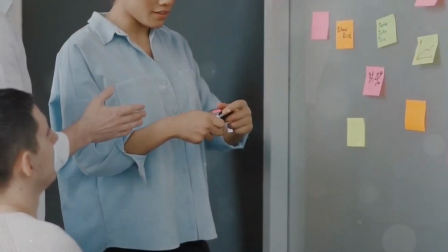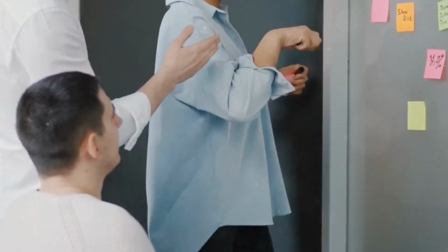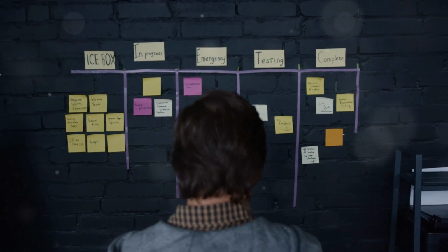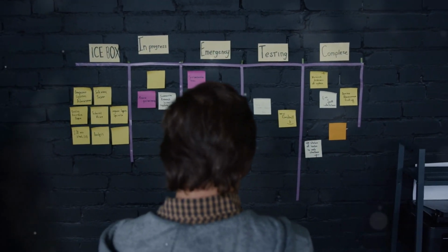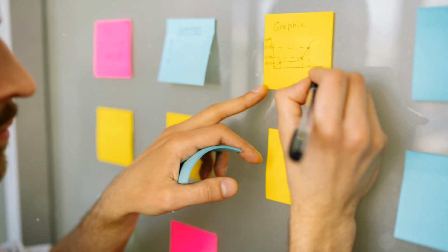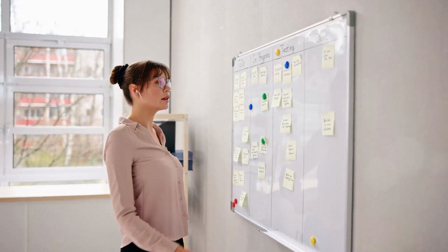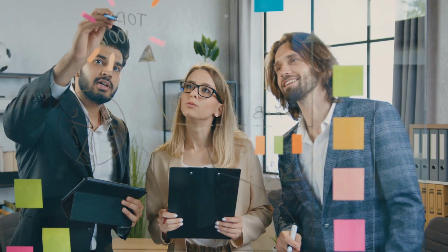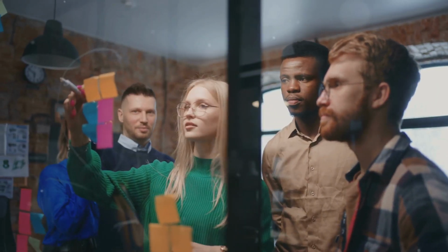To make scanning the board even easier, teams often rely on color-coded tags. Colors are instantly recognizable and allow the eye to catch important signals without reading text. For instance, red could indicate blocked, yellow might mean needs clarification, green could be ready for dev, and blue could highlight high priority. These visual cues improve efficiency, especially in daily stand-ups where time is limited.